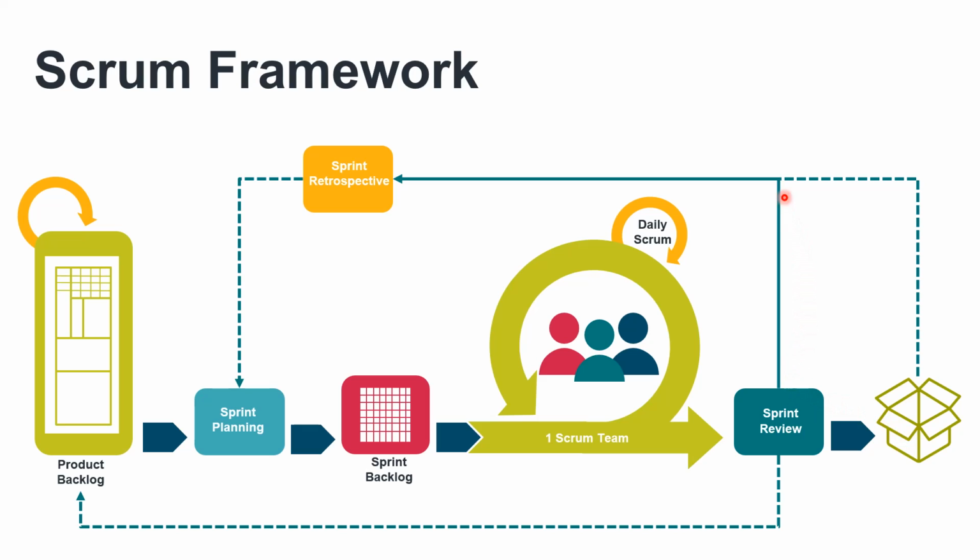If we follow the diagram, we go kind of backwards, and we have the sprint retrospective meeting here. This is when the team internally reviews their performance. They discuss some issues and try to come up with a list of improvements for future sprints. And then the next sprint planning happens, and the team goes through the whole process all over again.